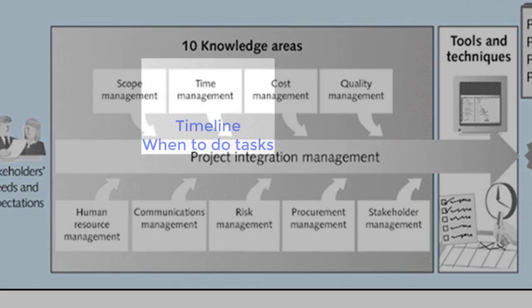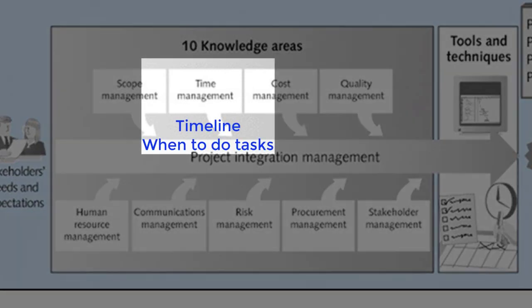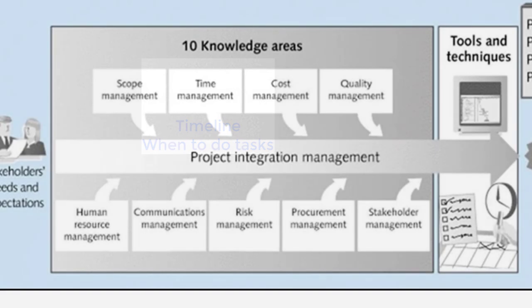Time management is mainly about figuring out when tasks and activities need to be done and in what order, then keeping the project on track. For example, in the renovation you would need to uninstall the old kitchen before installing the new one.